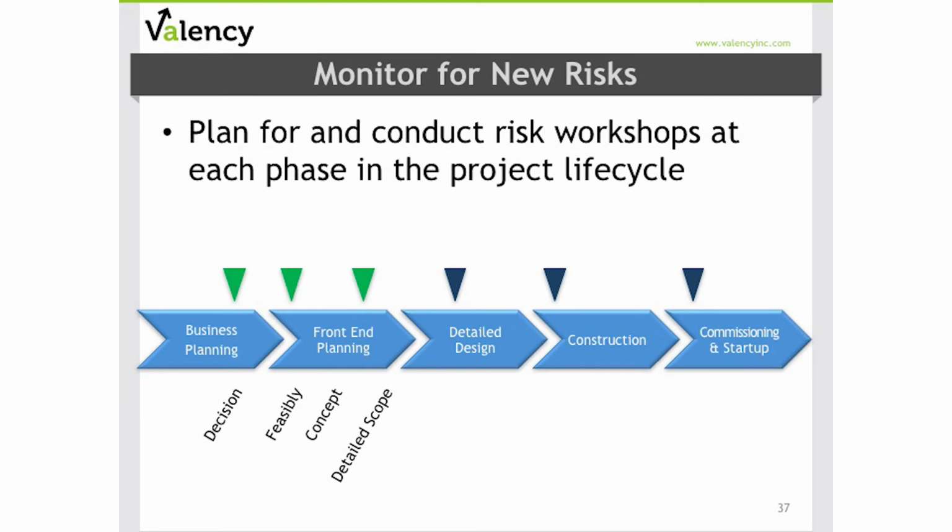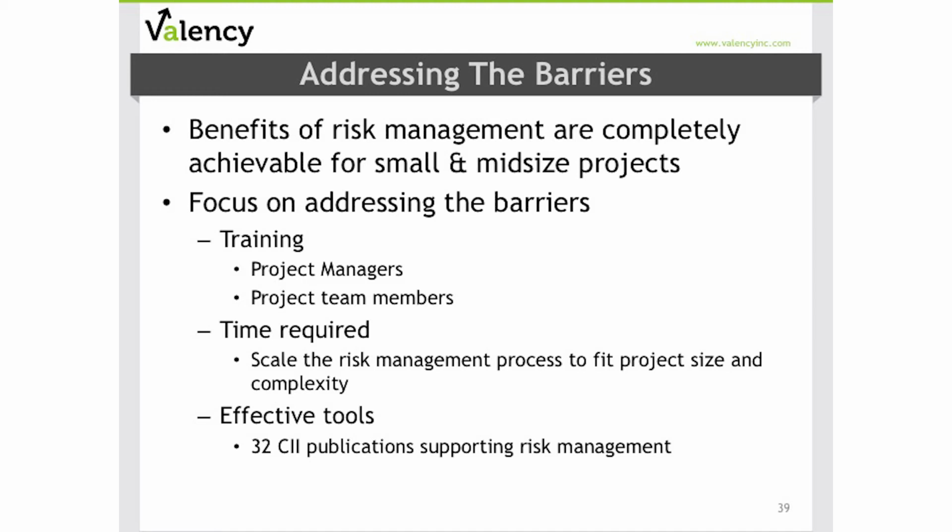As you progress through each phase of the project, we also want to make sure that we conduct those planned risk workshops to monitor for new risks in the project. The best strategy that we found to make this happen is simply to build those risk workshops into the early project schedule as key milestones to complete. As we consider these barriers, the really good news is that with a strong implementation plan, the benefits of effective risk management can be achieved on a very wide variety of project sizes and complexity. It simply comes down to addressing each of these barriers up front.